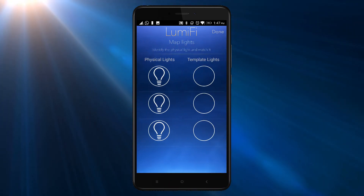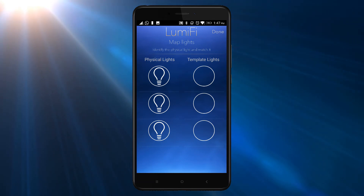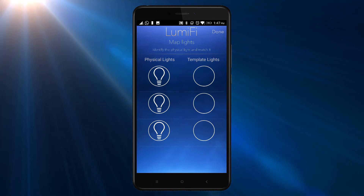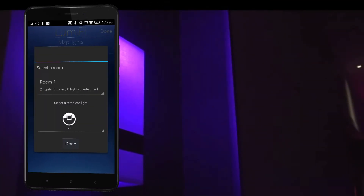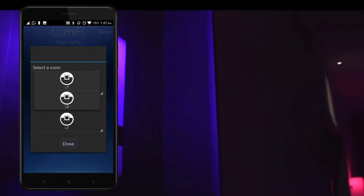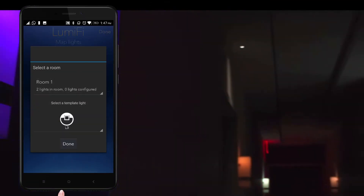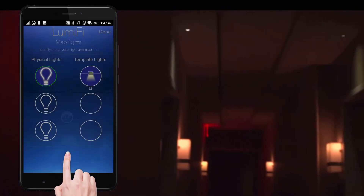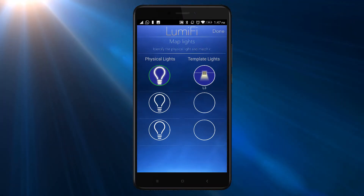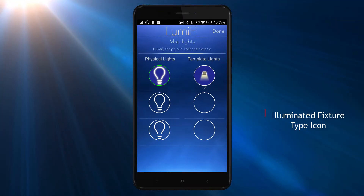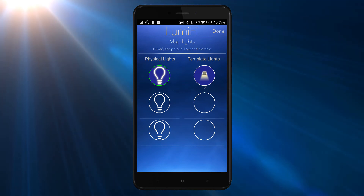Now you only need to map the physical lights with the template lights. You can identify the physical light in the space by simply tapping on the physical light icon in the app, and the corresponding physical light will turn on. A commissioned light will appear in the app as an illuminated fixture type icon.